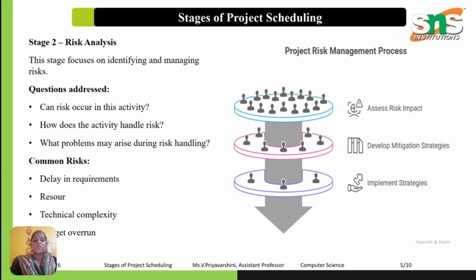Common risk: requirement changes. A customer may request new features during the development. For example, a library suddenly asks for online book reservation functionality. So this increases the workload, right? Next is resource shortage. Suppose the only developer becomes sick for 2 weeks. The project schedule will be affected.